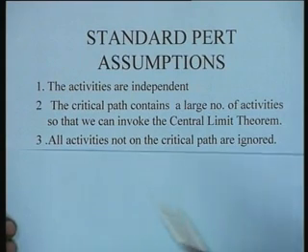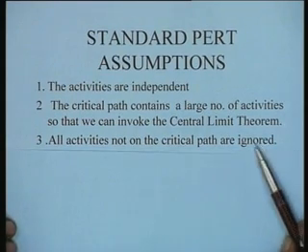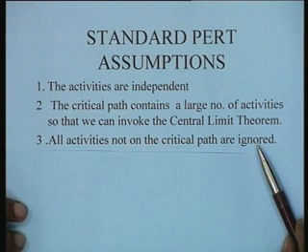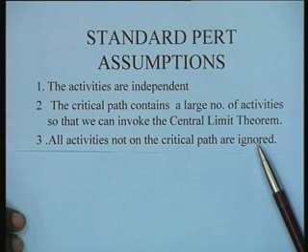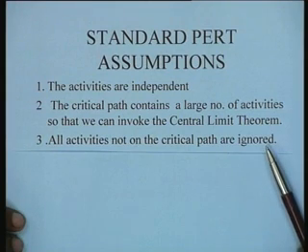However, another interesting assumption that has been made in PERT is that all activities not on the critical path are ignored. At no stage did we consider those activities which were not occurring on the critical path, and yet because of the randomness of activity times, it can happen that a path which is near critical or not critical at the moment could become critical at a subsequent time because the activities could stretch.